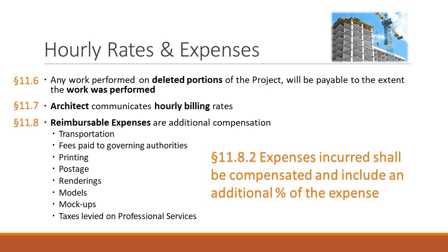Compensation for reimbursable expenses. Well, you're going to have expenses like transportation, long distance. So there's this list here under 11.8.1 of all these costs that you're going to incur during the course of the project that you're entitled to be paid for. So you get your basic services, and then you may get your reimbursable expenses, which is outside of the price for the basic services. Depends on how you negotiate.